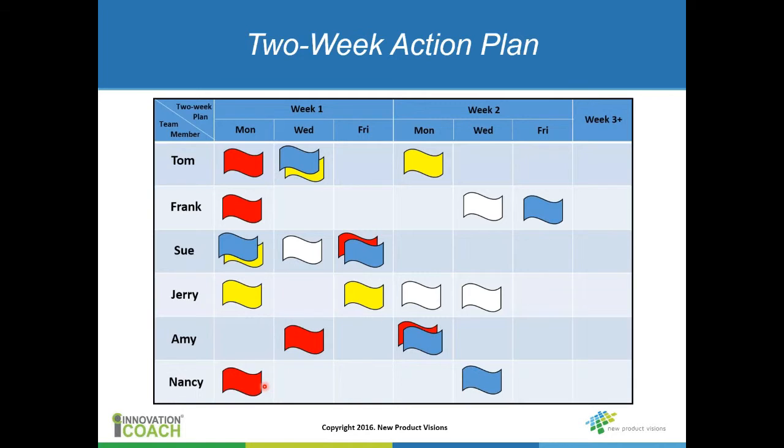The third key part of the board, and really the heart of this concept, is the center section of that visual board and the 2-week action plan. So again, you start with your high-level project schedule that goes from the beginning to the end. In the previous 2 slides, you hone in on maybe a 2-month window, and now you're going to hone in further on 2-week tasks. So these are the actual tasks that are really important in terms of driving the project forward. And this consists of the key team members over a 2-week period.